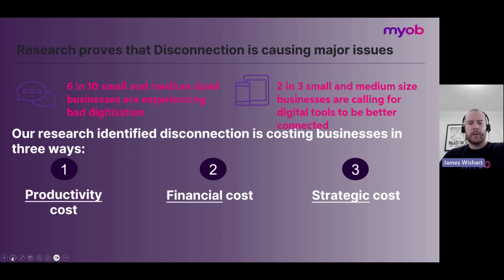So the health department had an initial budget of $3 million. But because of a lack of oversight, lack of controls around the process, and the fact that the inventory wasn't being stocktaken regularly and they didn't know how much was on hand, they ended up buying considerably more than they intended to over the period. Their warehouses expanded from 2 warehouses to 10.